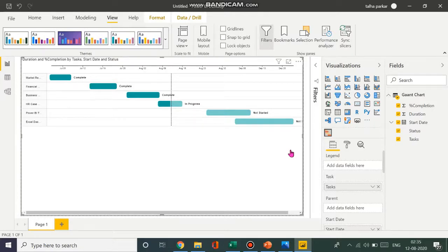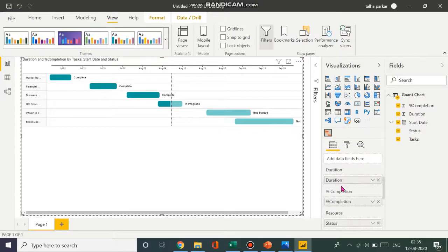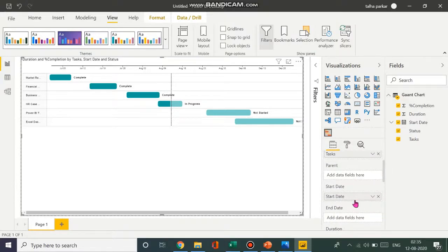I hope you learned something new. And remember, I created a customized data set just for this particular video. So for example, if you're working with a real-time data set, you need to have these particular fields. Only then will you be able to create a Gantt chart. Anyways, you need a start date and an end date and a duration and some tasks to create a Gantt chart, even if you're doing it on Excel or Tableau for that matter.